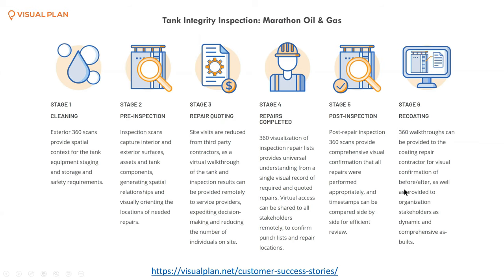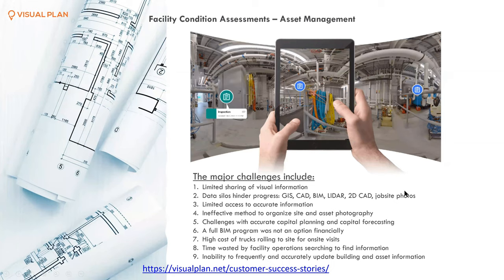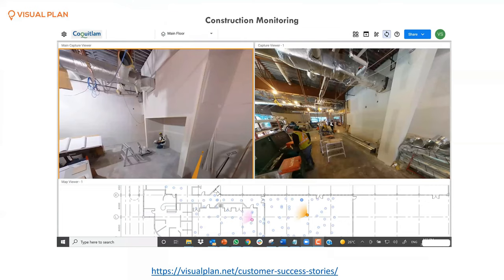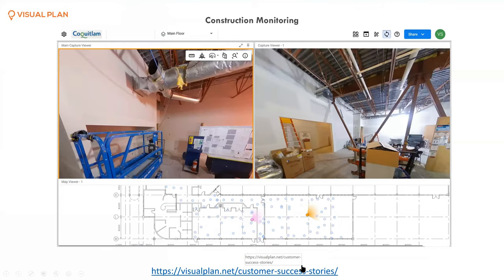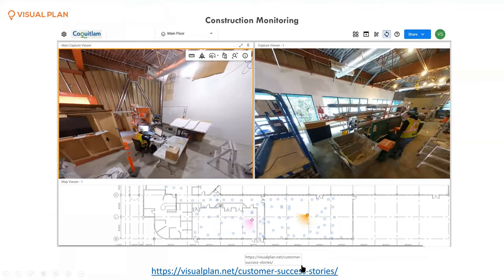We have a case study on our website with more details. Another project with local municipalities in the Vancouver, Canada area involves organizations without an active BIM program and with very little or inaccurate facility documentation. This provides a cost-effective way to create visualization and understanding of where things are located. We're starting to tag assets and add attributes — make, model, serial number — so service providers can access that information. This removes the trucks rolling back and forth, eliminates data silos, and reduces wasted time. On the same project, we're doing construction monitoring on a weekly basis to understand where the project stands.